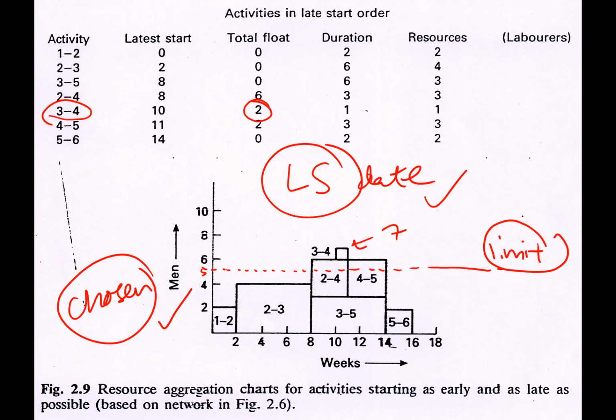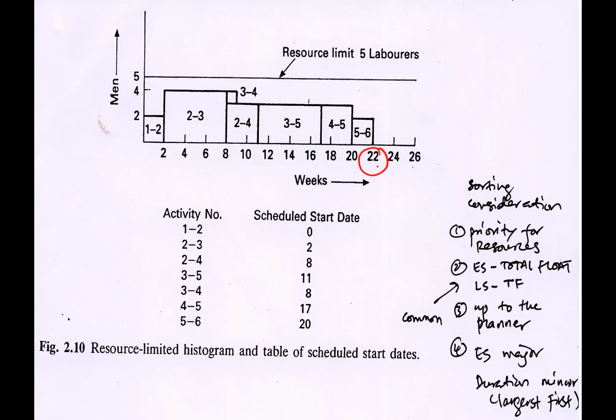If we limit, we are using what we call the resource leveling function. You notice if we limit, then what would happen to this activity? This activity should require more resources, 6 and 7, but we only allow up to 5 persons. So that activity should be extended in terms of timing. You notice the time to complete the project is 16 days. What happens if we apply resource leveling? So you see, the time has been extended.